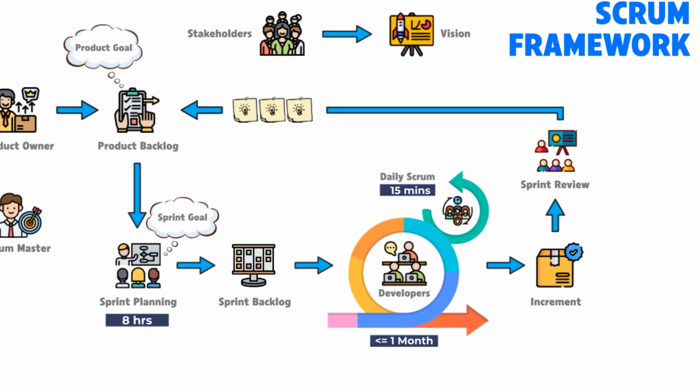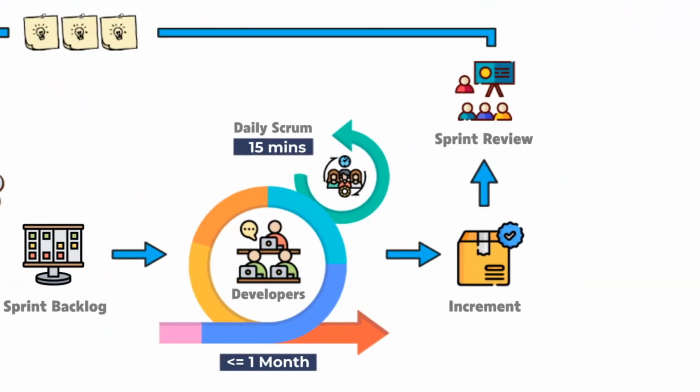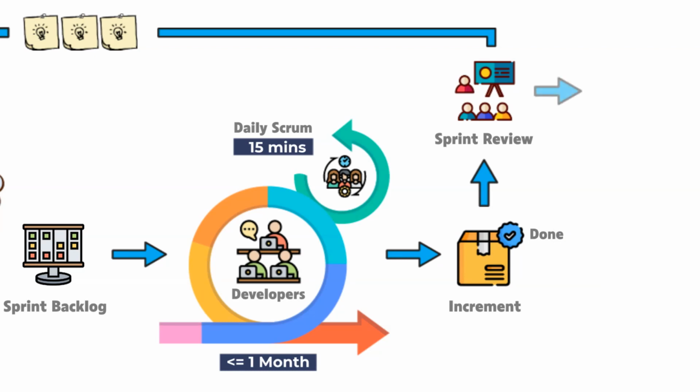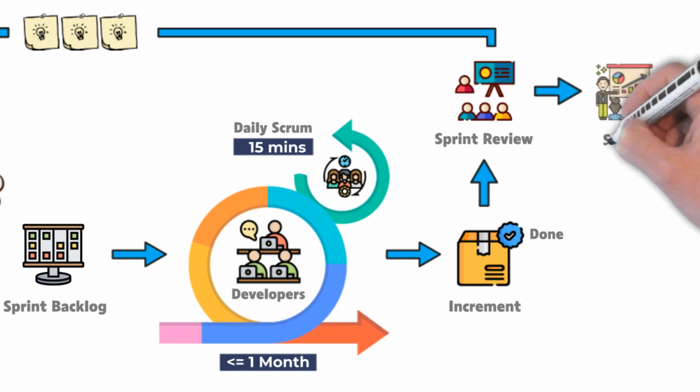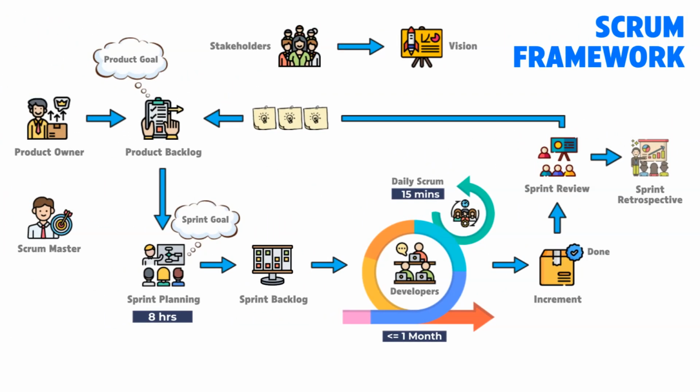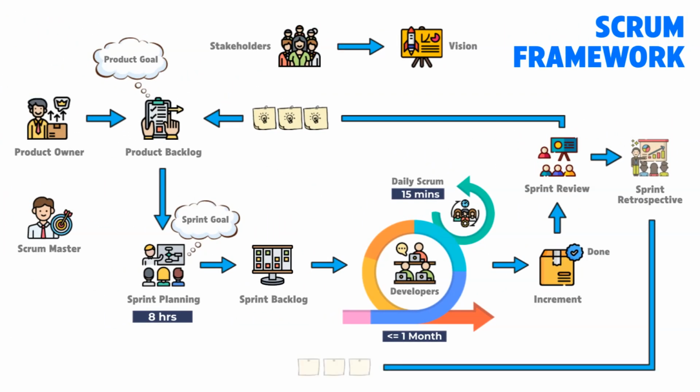At the end of the sprint, Scrum team meets to inspect themselves and the product quality defined using the definition of done. This event is named Sprint Retrospective. The Scrum team will review the team relationships, collaboration, processes followed during the sprint, and the definition of done with an anticipated outcome of a few improvement commitments for the team to challenge themselves in the upcoming sprint. The definition of done is also improved.